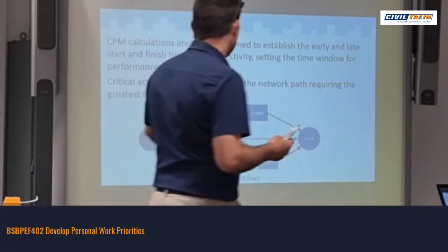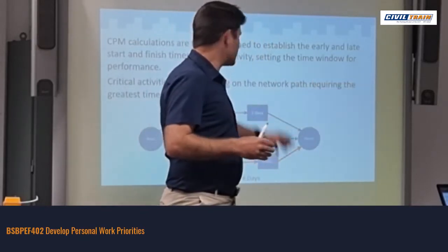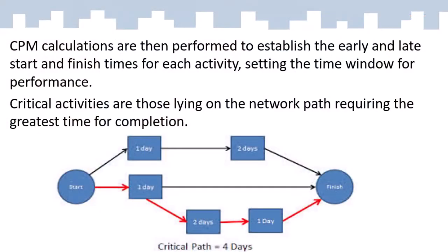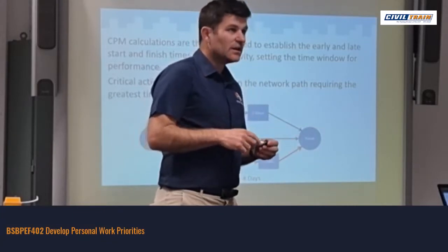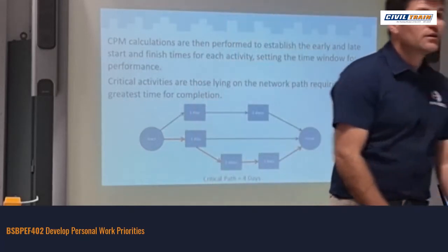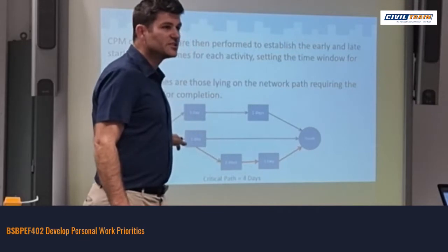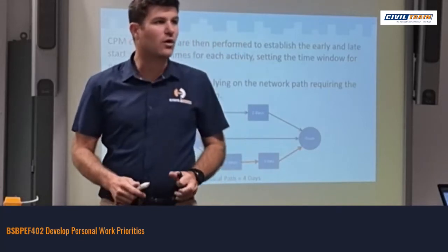So if I had a work team on this and a work team here, technically I could start by 3 days. I've got a day up my sleeve theoretically in that planning. So when we work out the critical path, we're basically working out the longest duration of the actual project. Now, I guess it depends on how your work schedules are calculated. If it's been budgeted that your program is done on critical path, what we're saying is that this is again a perfect world scenario on planning. That means within those 4 days, nothing goes wrong.